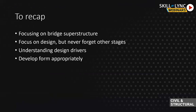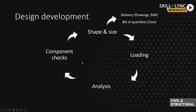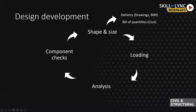To recap: we have focused on the bridge superstructure, talked about the design loop, and understand how design drivers affect the form of the structure. Cost is important, but you need to make the bridge work before you can put a number to it. Once you develop the concept, you start this design loop — you've selected the shape and size determined by the site, requirements, usage, and material availability. You tend to design loading, analyze it, and do component checks, considering a few different shapes, sizes, and alignments. Then you go into delivery: drawings, a BIM or 3D model, and a table of quantities for pricing.